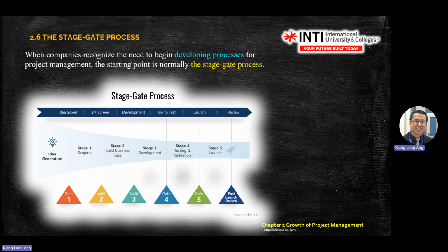First, proceed without changes. Second, proceed with changes. Third, on hold, wait for more information. Fourth, cancel the project. Right? On hold, wait for more information, means go back and ask for more information. Then if the information doesn't look good, the last resort is to cancel.